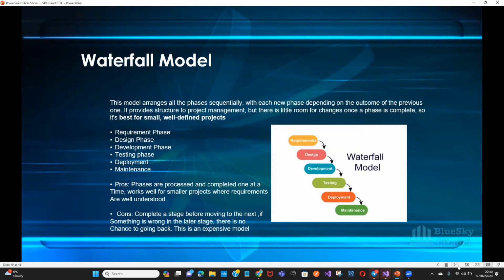And the project was meant to last for 10 months. Then while the requirement phase team is working, the remaining phases, the design, development, testing, deployment, and maintenance phases, have to hold on. That means they are not doing anything and they will be paid, which is expensive for the company. Can you see one of the disadvantages now? So if it takes the requirement phase a whole month to finish, it's a loss. That's the cost issue.